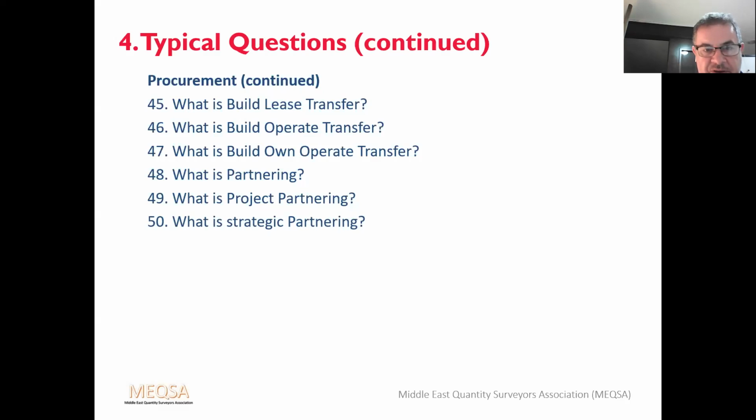Okay, that's project partnering. So what is strategic partnering? That is a long-term relationship for a number of projects or works that will last over a long period. Framework agreements allow this and are implemented on a project-by-project basis. So basically, the partnering team signs up to delivering, could be like 10 schools, for instance, rather than one school, they could deliver 10 schools on a rolling period.